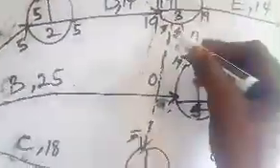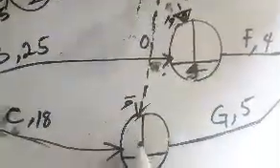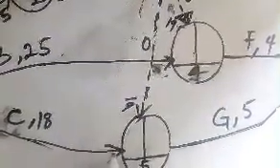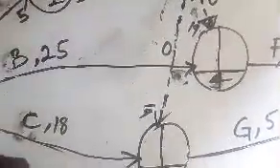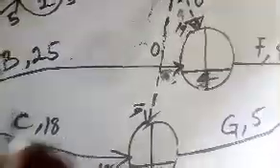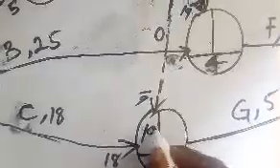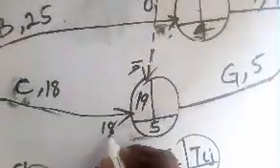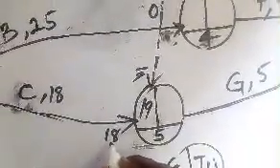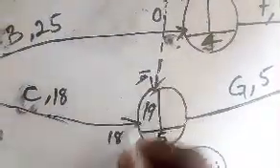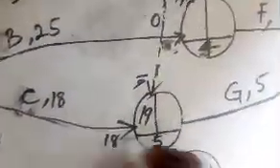Coming back here, we've analyzed that we have 19 here. So 19 can also enter here because I have another activity. I need to consider the greatest. So let's go 0 plus 18. I have it as what? 0 plus 18, 18. 18 and 19. You see, the greatest is what? 19. Adding this is 21 or 20 rather, or greater than 19, I will put it here, but 19 is greater than 18. So 19 will come out.